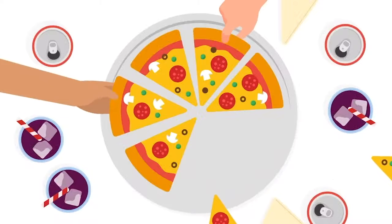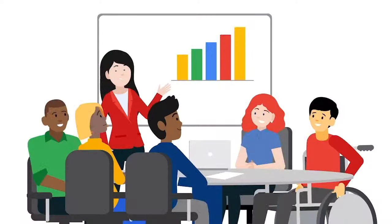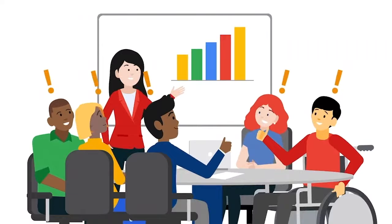Scrum lends itself best to certain types of projects and teams. Ideally, a Scrum team should be cross-functional with around three to nine team members — some call this a pizza-sized team because it has the same amount of people who could share a large pizza. If the team is too small, you might not have the diversity of skills to get work done; if too large, it gets hard to distribute information. Scrum works best for projects where the team and management are open-minded, adaptable, and value continuously learning how to be a better team. Trying to force a team to do Scrum will almost always fail. Although Scrum emerged from software projects, people have adapted Scrum to suit all kinds of projects from wedding planning to house moves to building rockets.